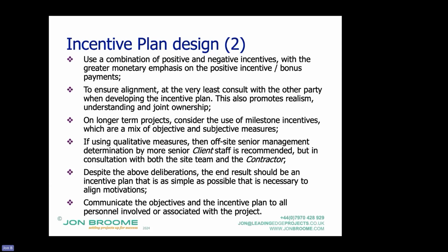I say use a combination simply because if you don't have negative incentives, damages in the contracts, then you're going to have time at large, for instance, or the cost at large. And very few contractors would enter into a contract on that basis, as in it's open-ended. So it is quite common to see delay damages at £1 a day or something like that. The upside of that is having positive incentives sufficient to motivate the contractor.